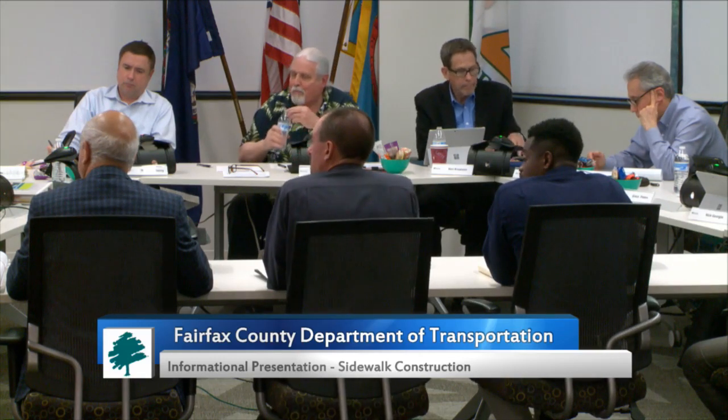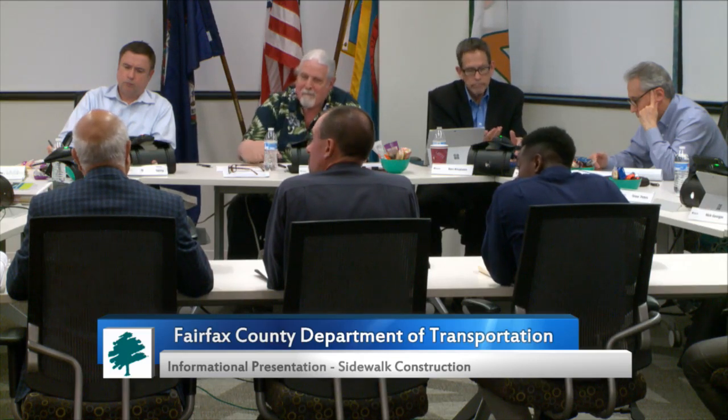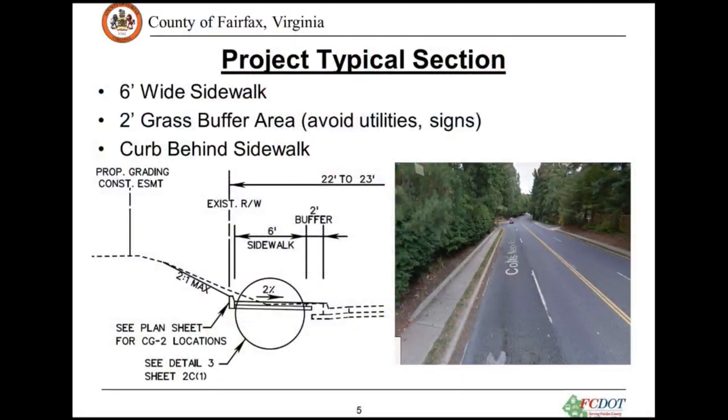Just for your information, we're proposing this one, and this one has to go to VDOT for approval. We're going to send a waiver for 2 feet, and a waiver for the utility disruption, depending on whether it gets approved. Good, thank you.